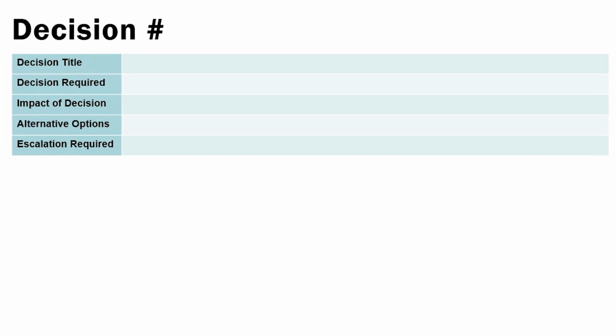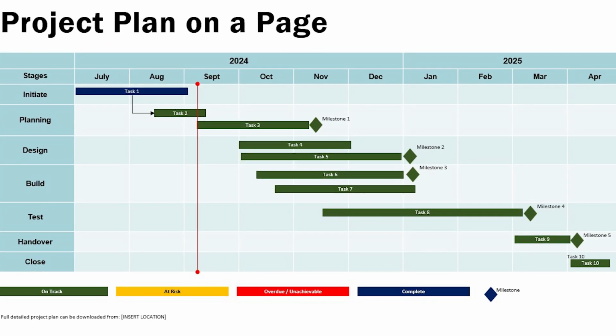Think about the SteerCo itself. This sits at the intersection between the directing layer of the project and the managing layer, which is the area that you most likely operate in. The members of that board are responsible for enabling effective decision making, for providing scrutiny on the project, and helping to deal with any escalations that arise.